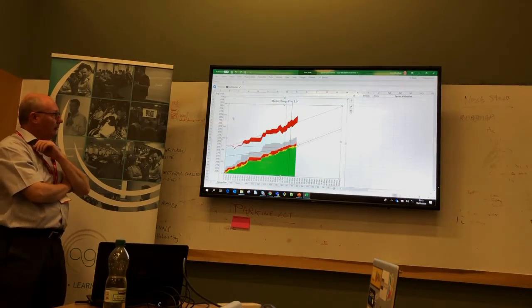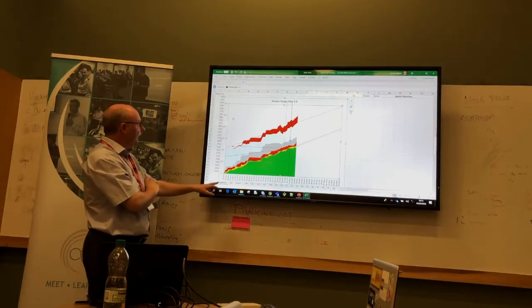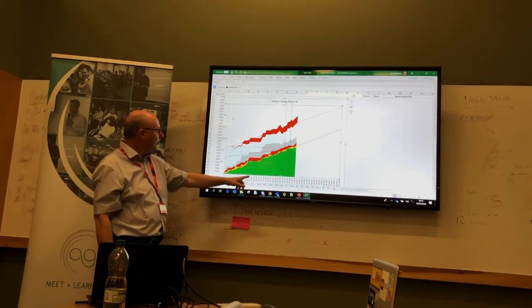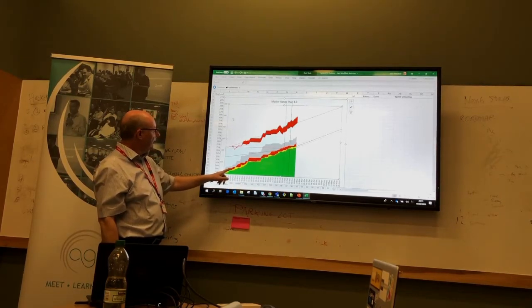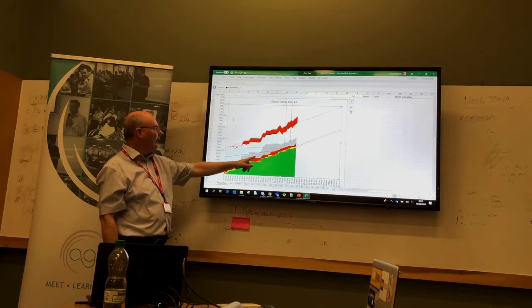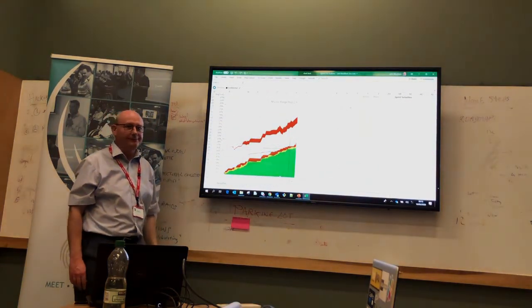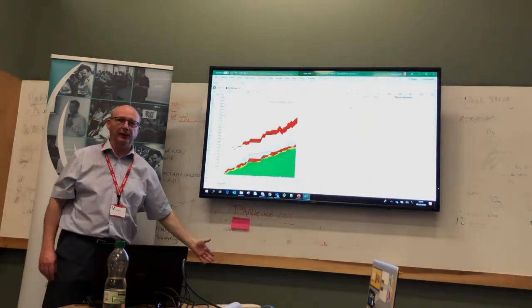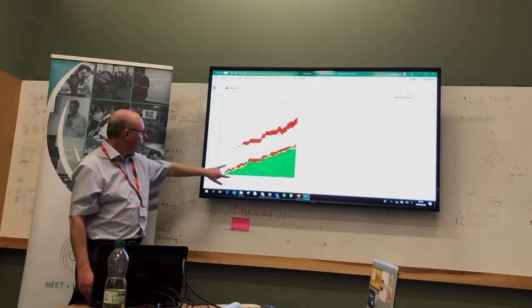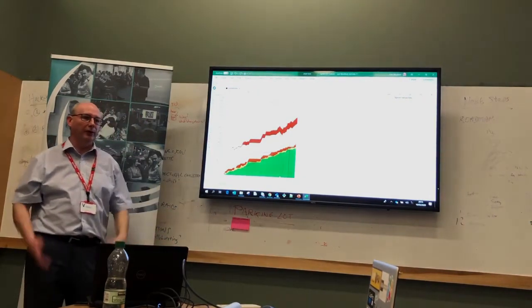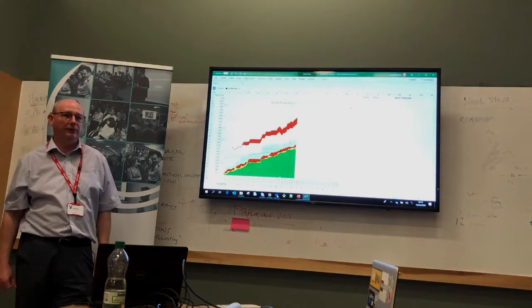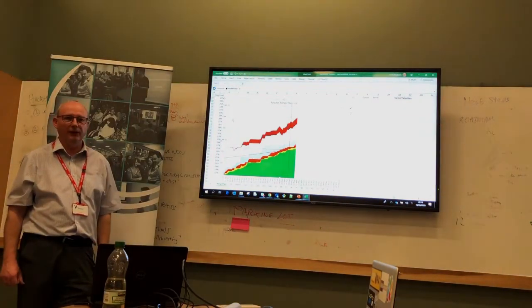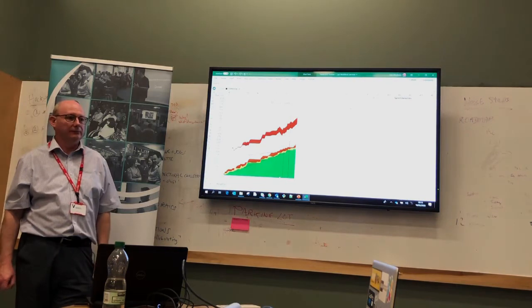Now, what I've been doing for predictability. We've got done, test, ready for test, development, grey is estimated backlog, sky blue is unestimated backlog. How can you plot the points for unestimated backlog? Well, all the stuff that was estimated averaged 4.7 points, so I said, well, everything that's not estimated is a 5 then. Pretty simple, a scientific wild ass guess as to how big everything that's not been estimated is. Reasonable assumption.